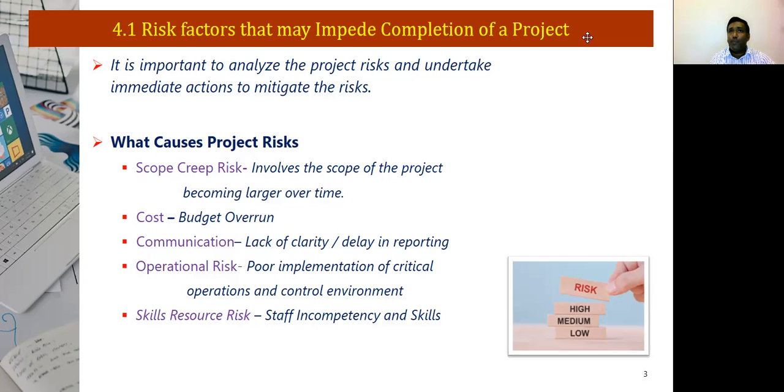Cost, where you have a budget overrun. Maybe at the time when we budgeted, the cost is not the same when we are actually procuring or purchasing it. Sometimes it can be due to inflation or maybe several other reasons, currency fluctuations, etc.